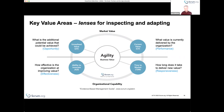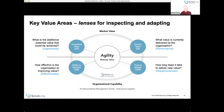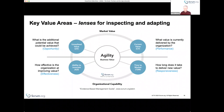Unrealized value is the additional potential value that could be achieved if we could perfectly satisfy all desired outcomes of our customers or users — think of it as the opportunity you're seeking. Current value is where you are relative to that potential — what's the current experience of your customers or users. You can think of it as performance against the goal. Below that, ability to innovate is how effectively the organization improves value.